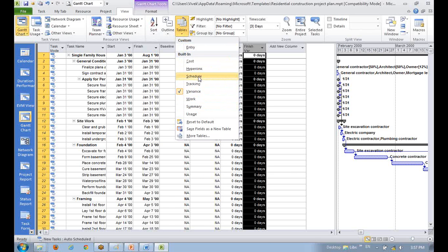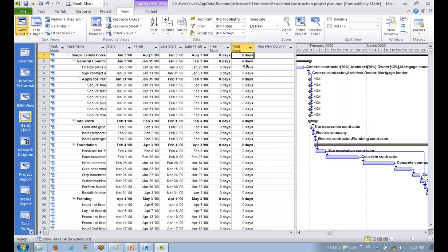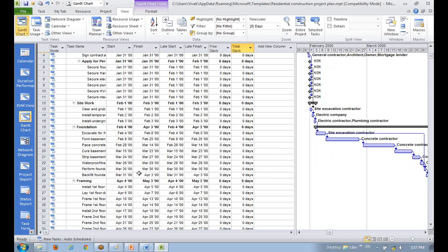If you go to the schedule table, you can also see the slack. If you don't know slack, we will cover it later. Slack is free time, also called float, free time available on any activity by which, if it is delayed, it will not impact the project end date. And all the